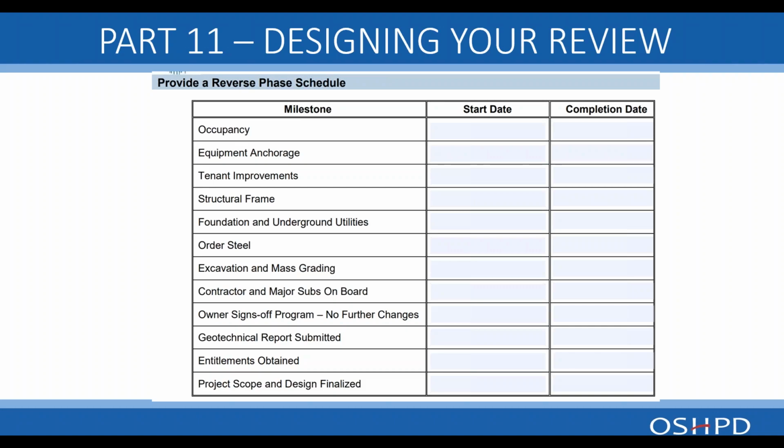And again, utilize the tools such as a make-ready project or a preliminary design, which can both be submitted early on to get feedback. Actually, make-ready projects can get the project started early on prior to submittal of the entire big project. So these are all things to consider and tools to use to design your plan review process.